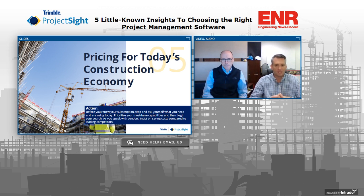And so really, for us, pricing for today's construction economy came down to how well this is going to manage our risk. A big part of that was the ability to tie in with the financials and track the changes, potential change orders and actual change orders. That was a big risk pool that could be managed, especially if we pull it all in together. And so that made the pricing more valuable in what we were doing.